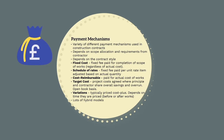Target cost contracts are different again. There is typically a target cost to complete the works, and the principal and contractor share profits and losses — this is called a pain-share-gain-share model. The principal and contractor work together to determine the target cost, then share savings and losses. This is the payment mechanism used on alliance-type contracts, which we will discuss in more detail later in section 3.